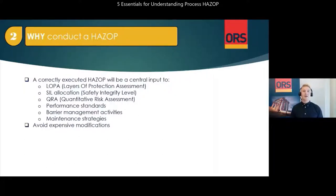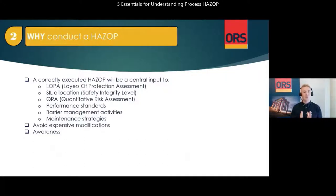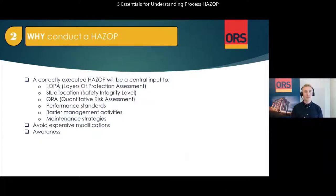We also have financial benefits to the owner of the process by minimizing the time and money spent on potentially expensive modifications to control systems and safety systems by identifying these issues before commissioning. It also functions as a type of awareness training to the team due to the nature of the method — to look at the process from a new perspective, not just how to ensure that this system has high availability, but also how can it fail, does it pose any hazards for people, the environment, our reputation, financially, and what measures do we need to ensure it is performing as intended.